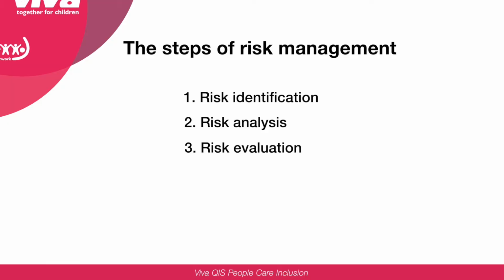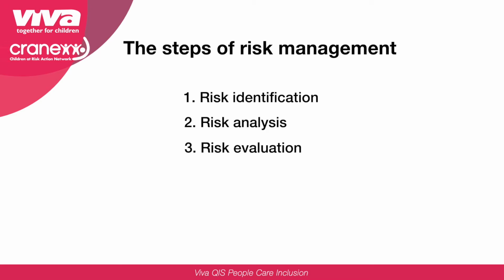So if you've done risk evaluation and the risk is serious enough, then you can go ahead and do risk treatment. This is also referred to as the risk response plan. Each organization should have a risk response plan. During this step, you assess your highest ranked risks and set out a plan to treat or modify these risks, as well as enhance the opportunities by creating risk mitigation strategies and preventive plans. And lastly, we monitor and review the risks.